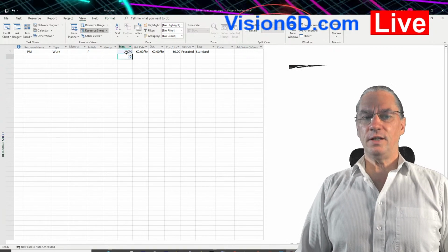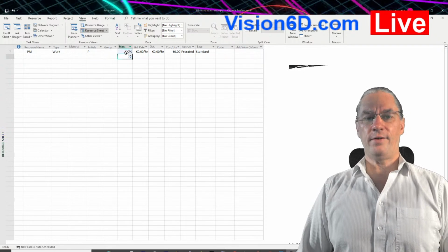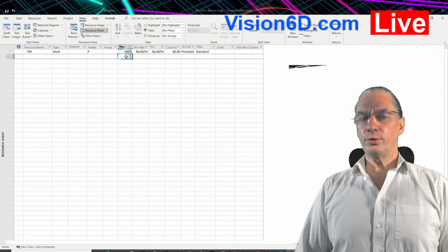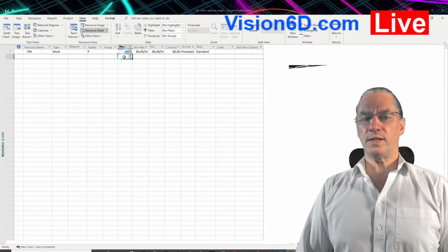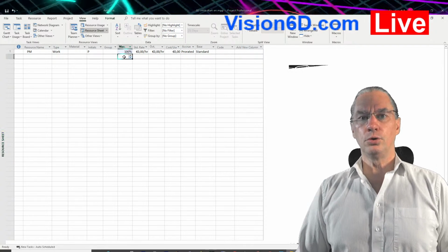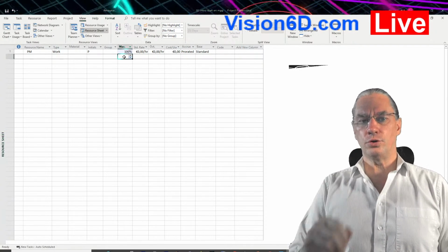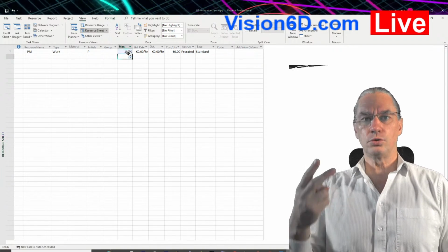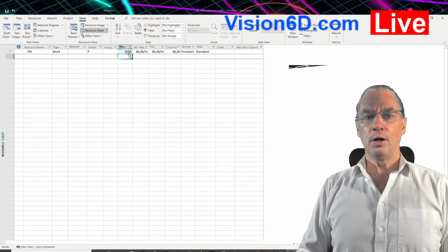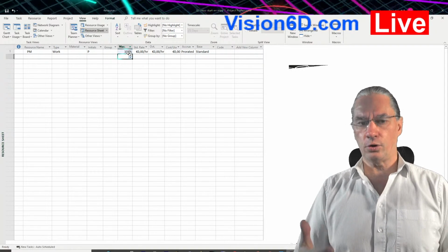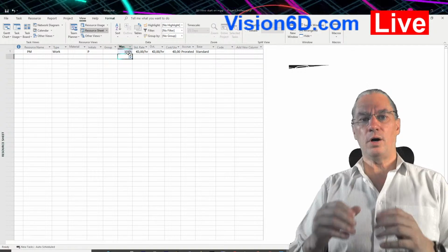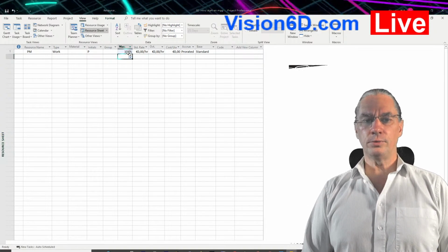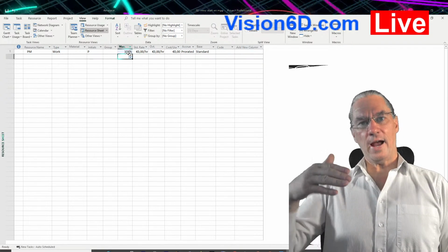Of course, if you have, for example, engineers working in this project, we could simply say a resource that is engineer, but they could be 2, maybe 3 engineers. So you could raise this to 200%, meaning the capacity of 2 persons, or 300 and so on, according to the team of engineers that would work. So this is a value that can go way up.